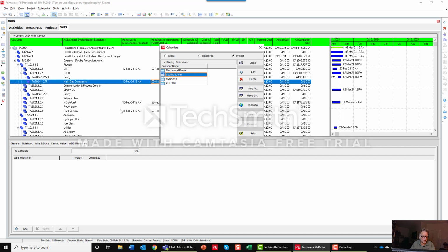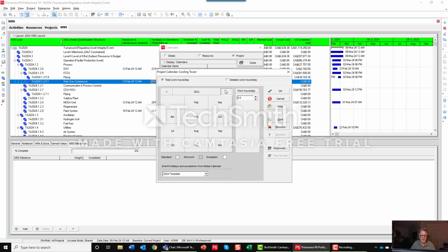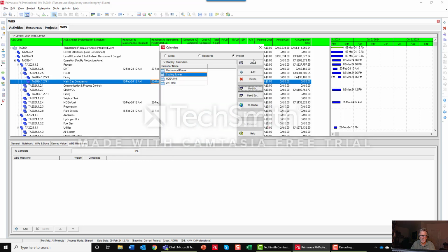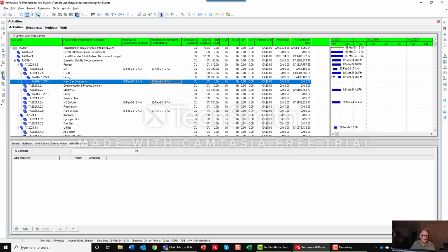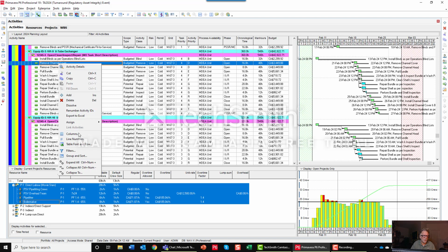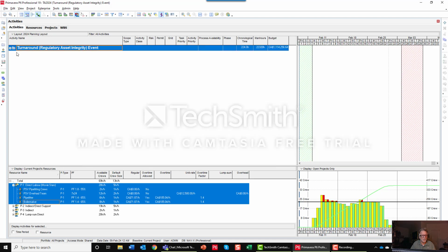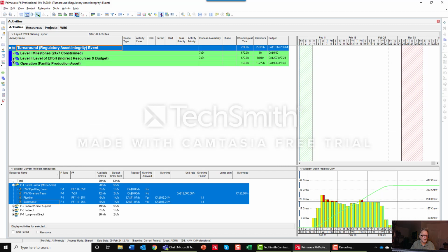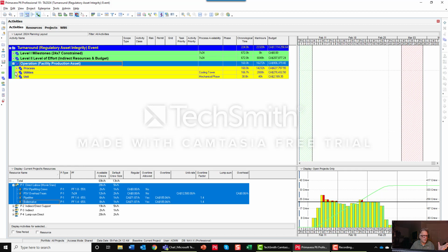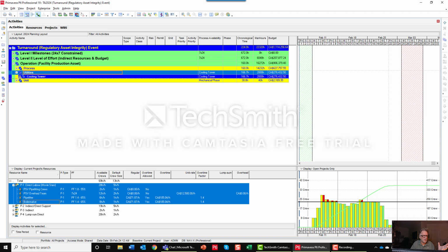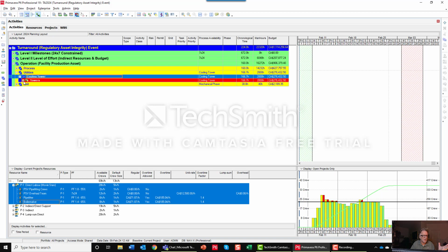You'll see down here I have a cooling tower window. I've gone in and said, well, this cooling tower is available. The process is going to give it to me on the 16th and they want it back on the 22nd. So when I go in and look at it from the utility standpoint, and again, this is all based on what operations says they need to give me this cooling tower, for example.